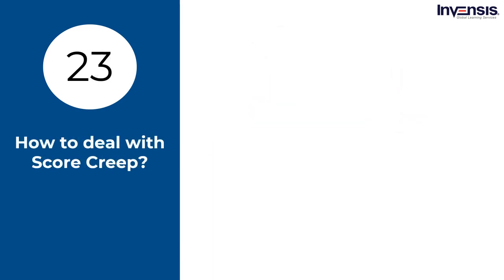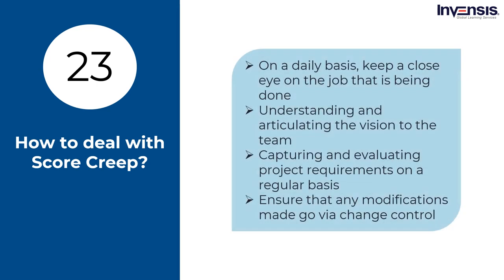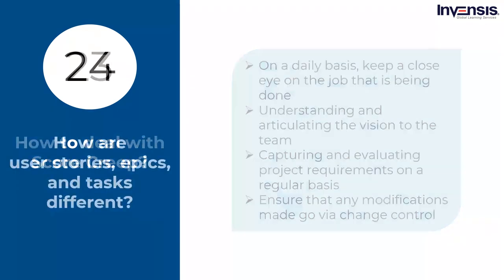How to deal with scope creep? Scope creep is when a modification is made without assessing its influence on scope, time, cost, and other factors. To deal with scope creep, you need to regularly monitor the tasks being done, understand and communicate the vision to the team ensuring everyone is on the same page, note and evaluate project requirements regularly with what is to be delivered to remind the team and client of the signed-off requirements, and ensure that any modifications go through change control and are implemented based on change request approval.